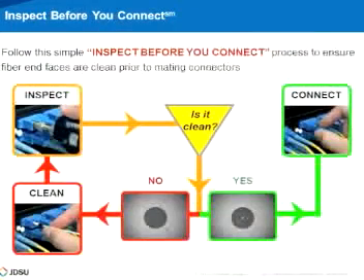Doing inspection after cleaning and making sure that it is acceptable will protect, for example, a contractor who is getting bad fiber from the supplier, or the service provider who's getting the work done by contractors, to make sure that the fiber that's going to be turned on later down the line will perform as it should.